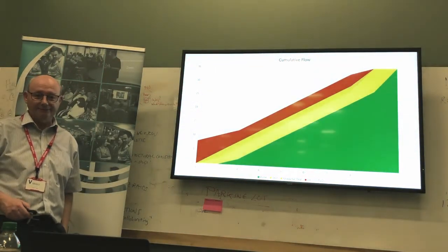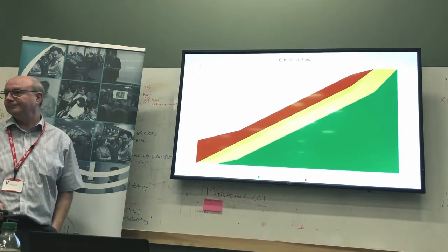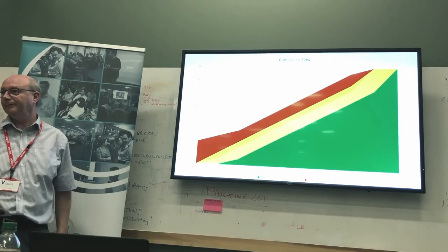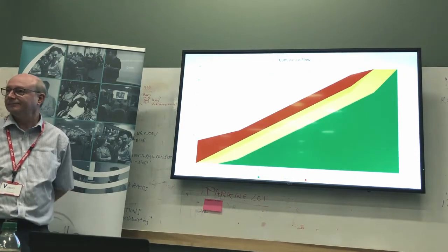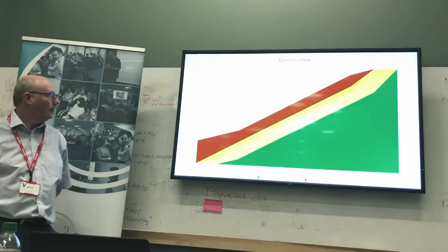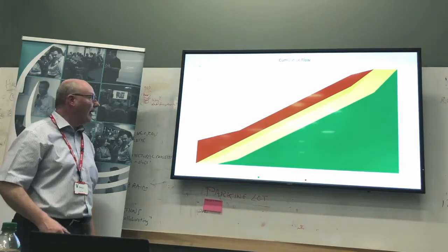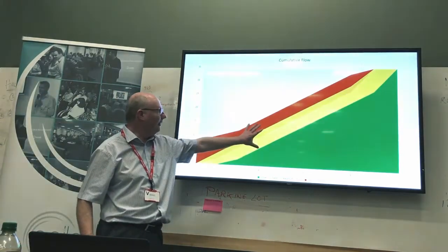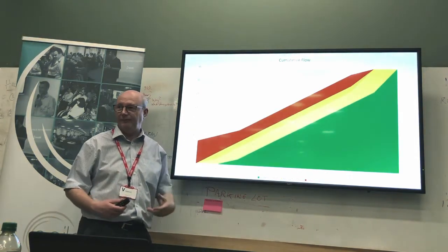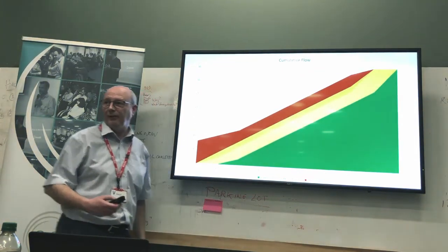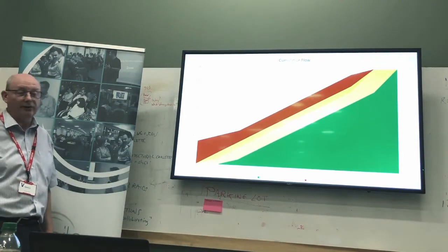They do exactly that. You struggle at this point as well to actually define the difference between testing and development. If you've got the Scrum team doing the full cross-board development piece, because obviously they're testing up front, they're testing as part of their development and ongoing work as well. So it all kind of merges into one. Yes, if they're doing pairing and TDD, you don't need 3 stripes here. Exactly. Because it's in development and then it's done. Or at least it's ready for completed and ready for the product owner to have a look at, if you want to split that out into columns.